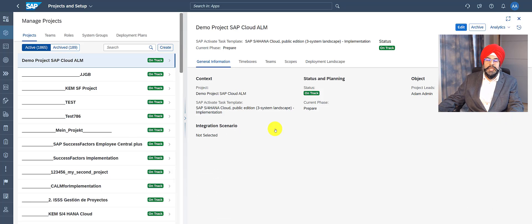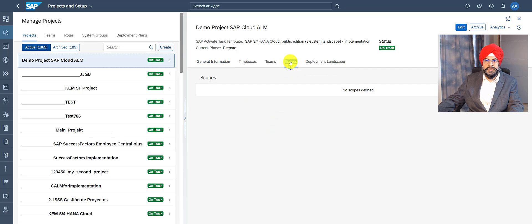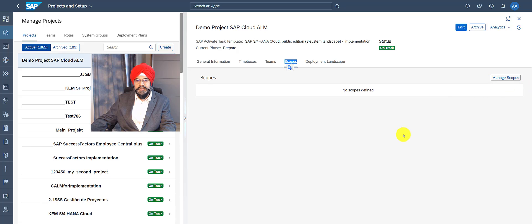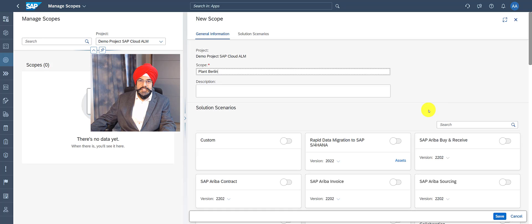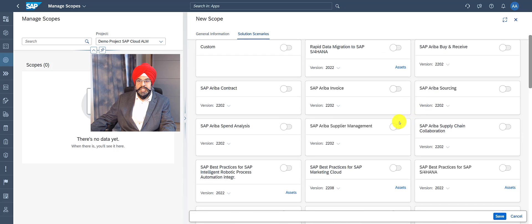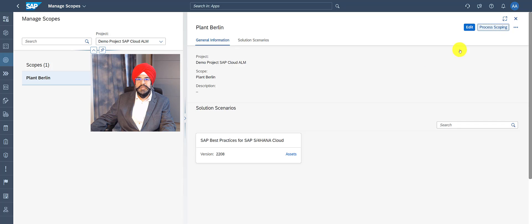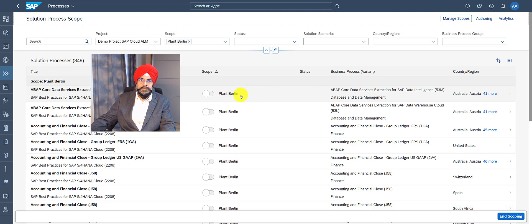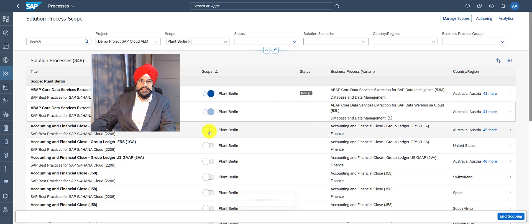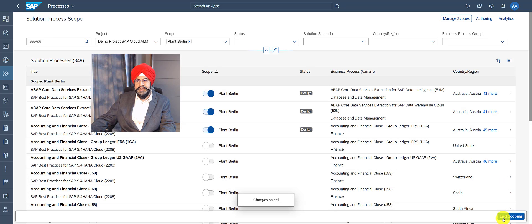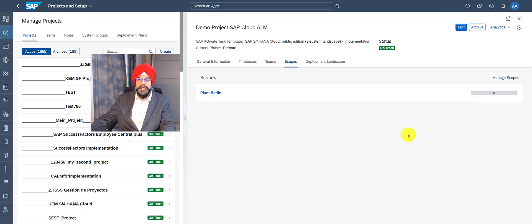Now let's go back to the project and proceed to the final step which is scope creation. I can create a scope by accessing the Manage Scopes application. The system gives a list of solution scenarios and each solution scenario comes with a particular content version, so make sure you select the right one. You can select multiple solution scenarios in one scope. After creating a scope you can easily proceed to process scoping to add processes in that scope. When I'm done I can click on End Scoping and I see my scope has been added to my project. You can also do an extended setup of the project by adding system groups and a deployment plan to get a deployment landscape — I recommend you check out another video which is dedicated on that topic.